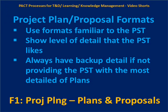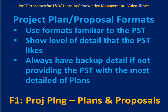My suggestion regarding project plans, proposals, and formats: use a format already familiar to your project steering team. Don't give them a new format and make them learn how it works — learn what format they already use and adapt to that. Show the level of detail the project steering team likes. If you prefer more detail than they want to see, show them a higher-level view of your plan, and simply have the details in your back pocket in case they challenge anything — then you can show them you've done your homework at a greater level of detail, saving them from having to look at all of it.